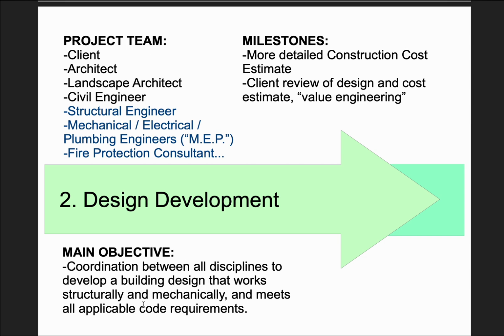You also want to meet code at this stage so that when you finally go to the construction documents and present that to the building department, it's not going to have a major revision, which is going to be costly and expensive in terms of man hours to redraw stuff.